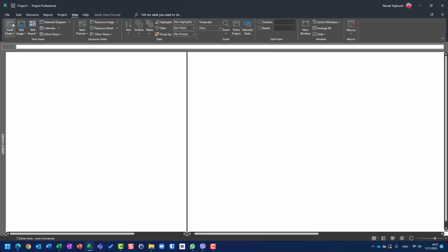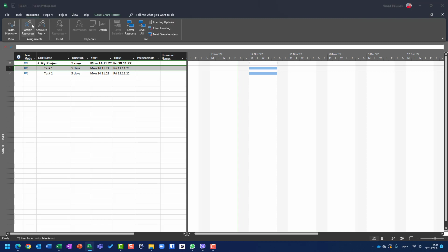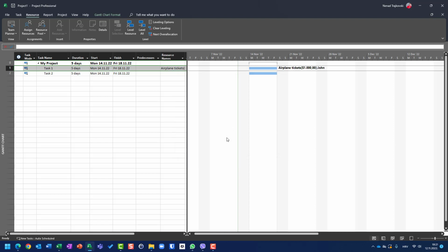Now, for task 1, I will assign John and an airplane ticket for him. For that purpose, I'm going to go to resource, assign resource, and I will say airplane ticket cost $1,000, and I will assign John as well, and I will close.